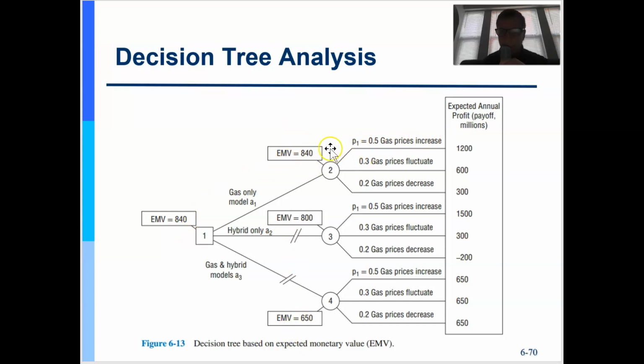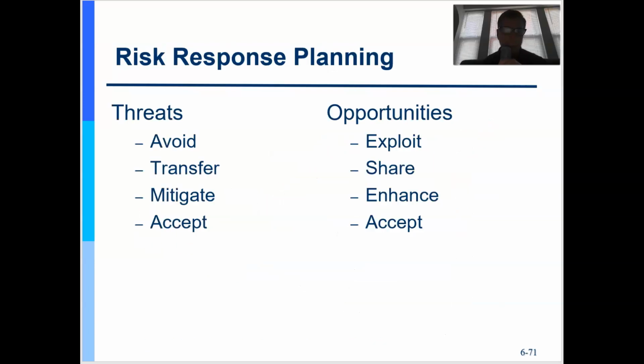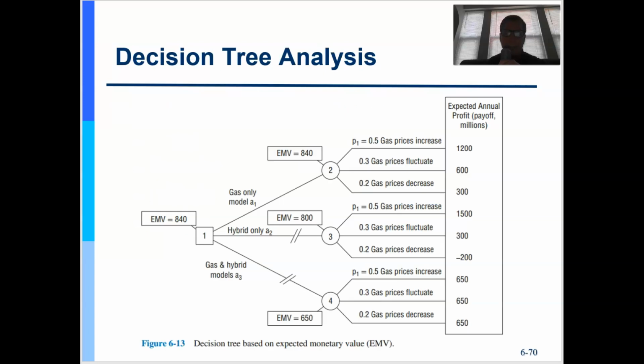And of course, my expected monetary value is highest with this second approach, with this 50% probability, but the impact being the highest here. That makes sense because they all have a 50% probability. All right, but I've multiplied those together and I back it into a decision. That's actually a decision tree using, as I said, expected monetary value.